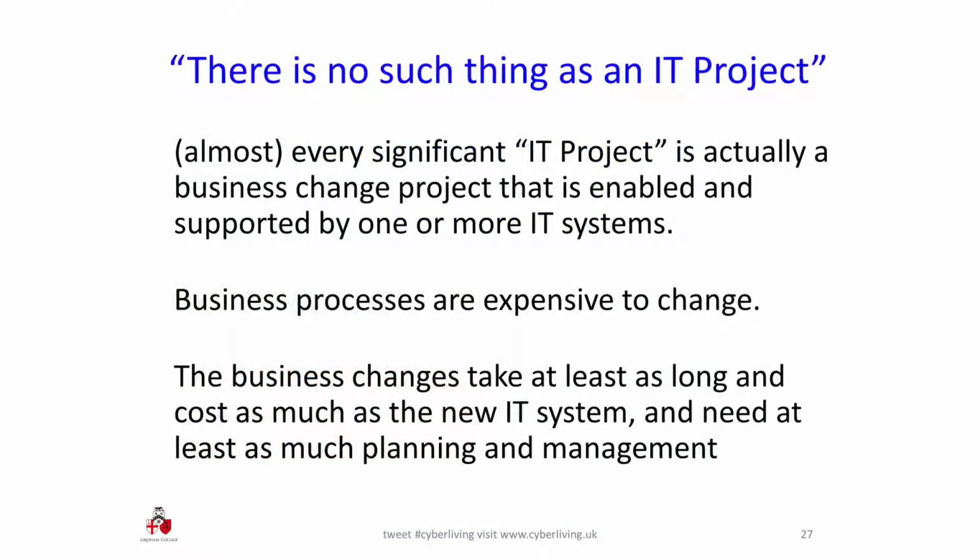One of the mantras that we've been trying to put out around government is that there's no such thing as an IT project. Every significant thing that you think of as an IT project is really a business change project enabled by an IT system to support the new business processes. But you've got to focus attention on the business processes, on the business change.